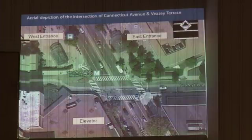We're looking at each escalator's replacement in its entirety being only about maybe three to 4 weeks. What I mean by that is that once we get to the point of removing the trusses, we'll start that Sunday night and work to Thursday, each night pulling out each individual section. There are about 6 to 7 sections for each of the escalators themselves. So again, that's where we have the staging challenge inside the station and outside. No truss would be staged out on the street at any time, except during the hours of delivery and movement of the trusses.